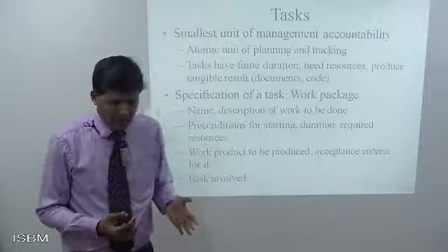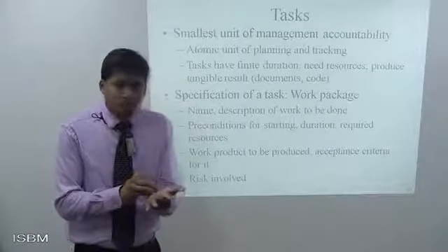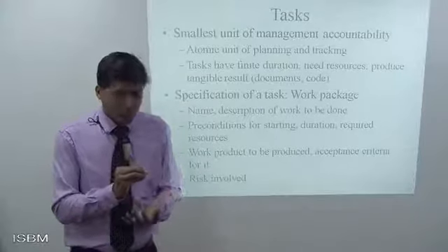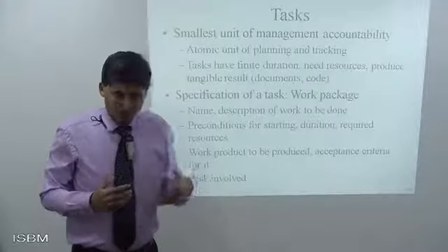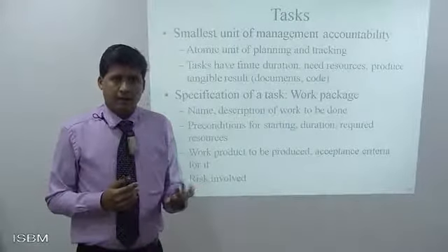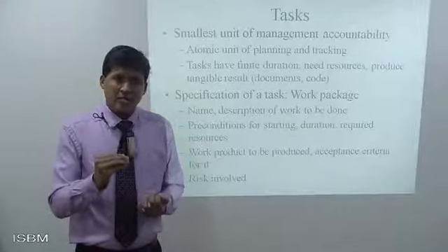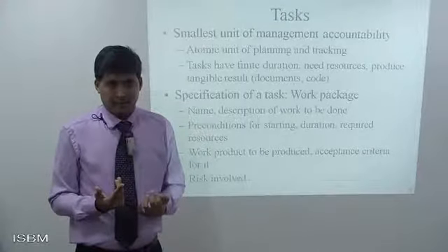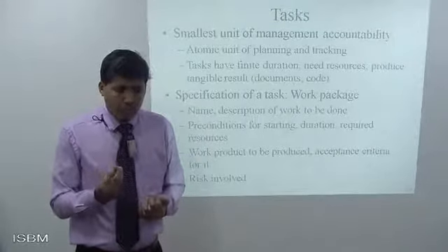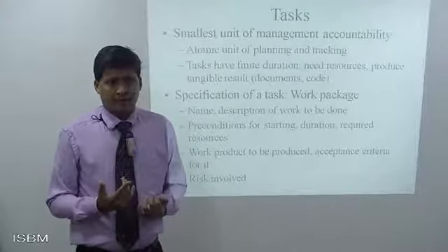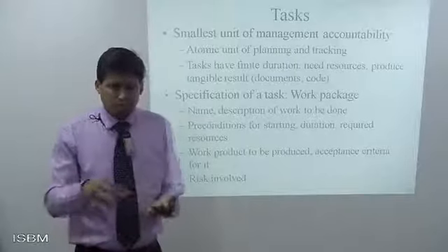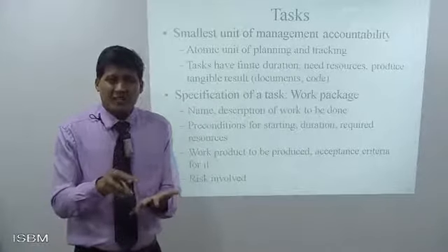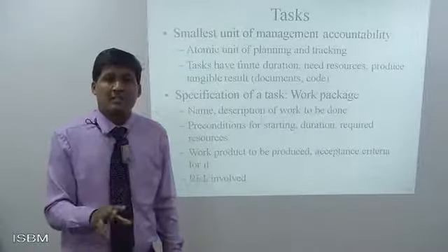Now it is important to understand that task is the smallest unit which could be tracked, controlled, measured. So if any project is running and lagging behind, or facing an error, the first tracking point is going to the task, checking each of these tasks, and each of these tasks is further measured and controlled.